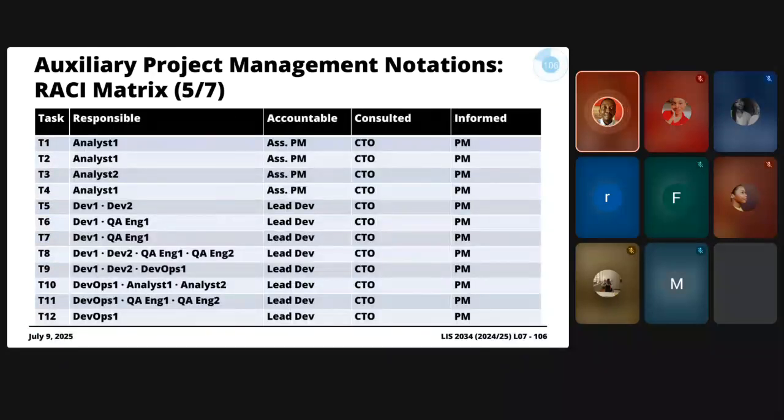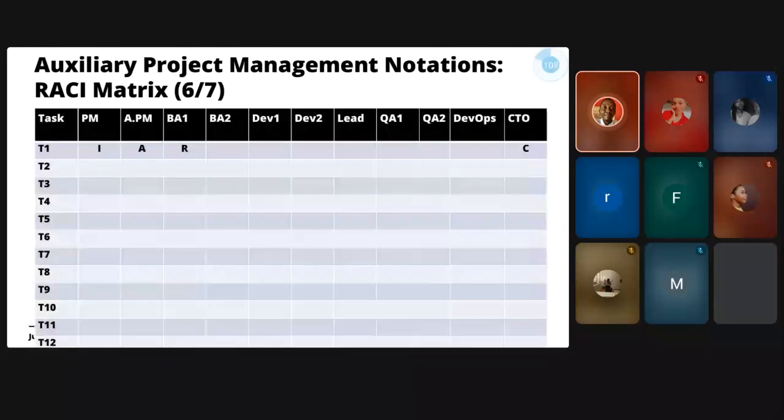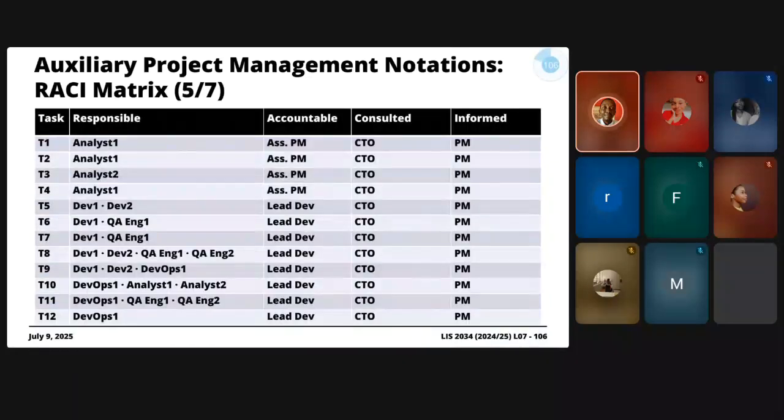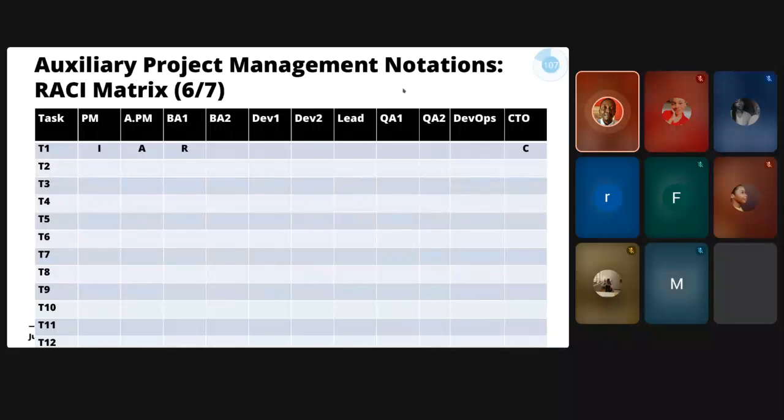Ultimately, what you would rather do is come up with something that is similar to this, right? So you're just like transposing this. Your columns become the different roles of the people working on the project, and then your rows here, we still have the tasks as the labels. In the content pane here, you are indicating tags, right? The actual responsibilities. Who is going to be, for task number 1 out of all of these different project team members, right? What is their role?